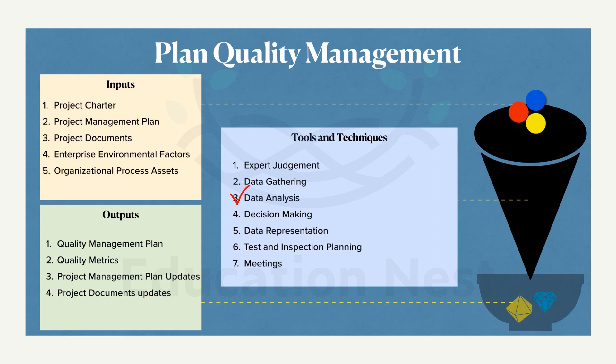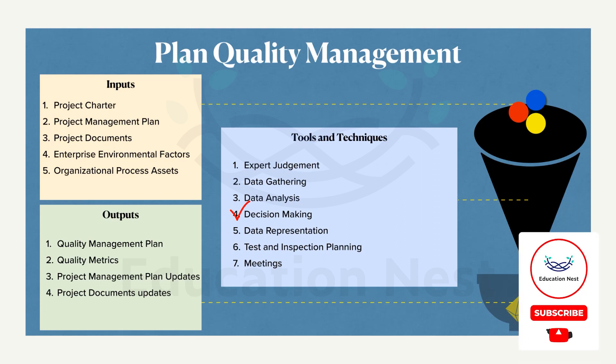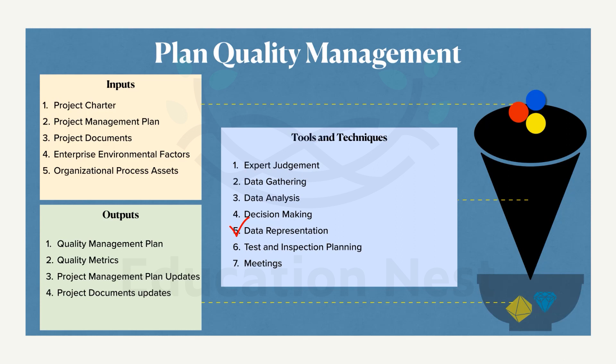For data analysis techniques in Plan Quality Management, the organization can use cost-benefit analysis — which checks whether quality inspection methods are cost-effective — as well as cost of quality. Cost of poor quality is also relevant. Decision making is another data analysis tool, which involves prioritizing a list of solutions and choosing the right one.